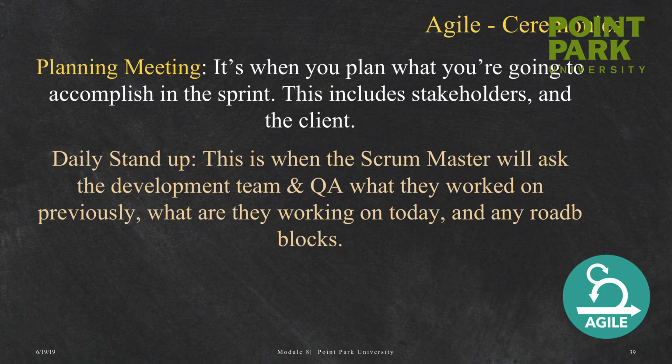2 hours is with the business, and you're talking about what you want to accomplish in this sprint. And then for the next 2 hours the business is not there anymore, and you're focusing on, okay, here's the backlog, here are the items that we're going to work on, and usually you're designing these on the board, because you might be in there for 2 or 4 hours. You're talking about what's going to be implemented, what you think is going to happen, what code you're going to use, and you decide a point system. Is this a 2 points or up to 20 points? And you give it points.